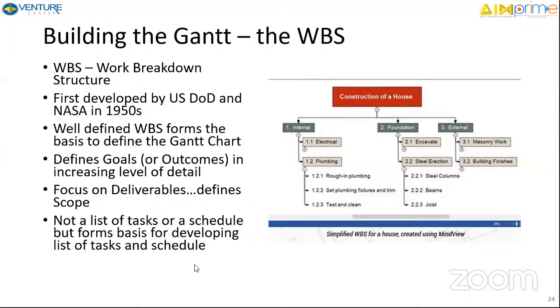You start with an endpoint or a goal or an outcome. This is like your milestone that you typically put in your Excel for a plan submission. You start with that milestone. So, prototype build completed, that is your milestone. To complete my prototype build, what do I need? I need four parts. To complete these parts, what do I need? I need designs, drawings, and final specification. To get to this specification, what do I need? I may have to finish some work to reach there. That's how you break it down.